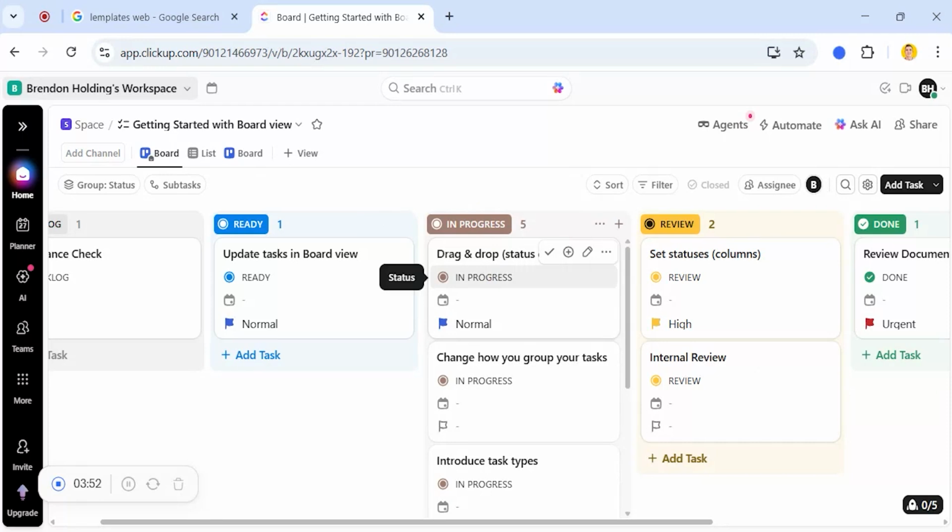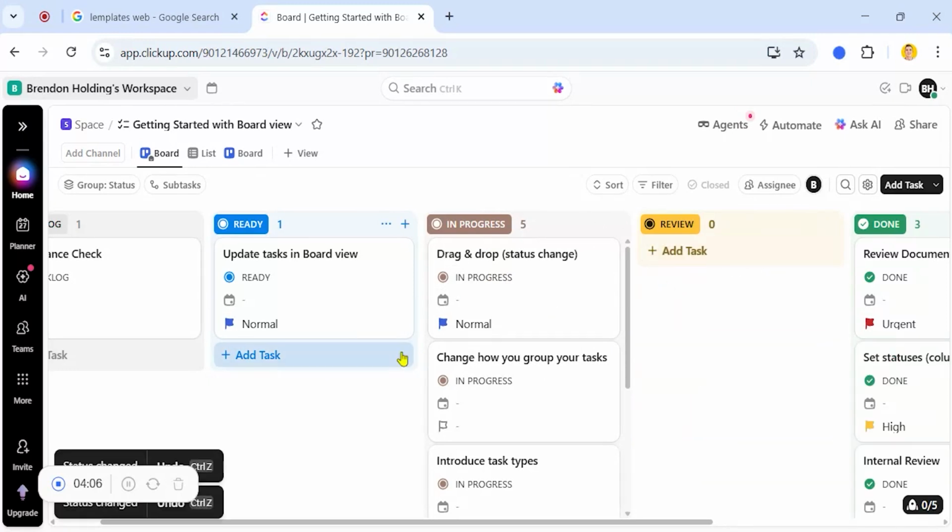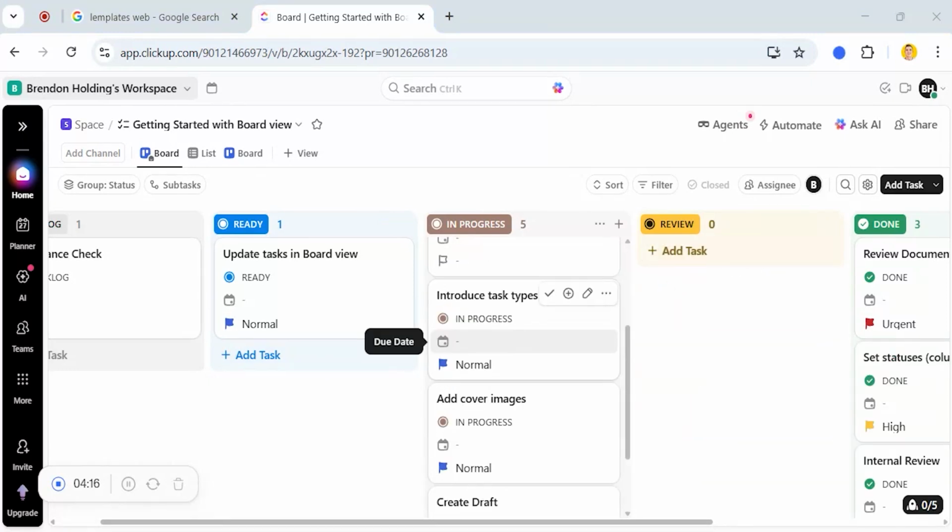So for repeatable work, I limit how many cards sit in progress. I encourage finishing before starting something new. And I let unfinished work be quite obvious. When active work is visible, teams naturally stop overloading themselves. This setup works because it removes noise.